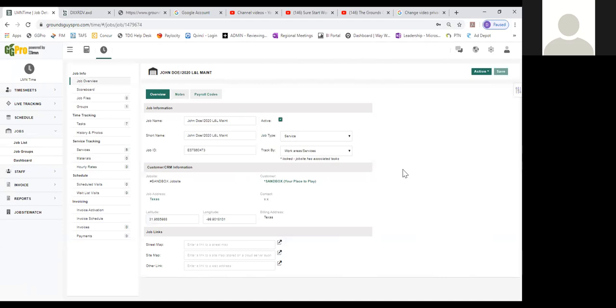So if they use 9 yards and the budget was 10, they're communicating back to you what their product usage was. I had a situation, we were in Toledo, going through their numbers, and they were talking about this one job. They said the job called for 82 yards of mulch, and they only put 47 yards down, and yet they spent like 90 hours doing it. And I thought, holy cow, it must have been a difficult job, like on a slope or something. So there were certain things that jumped out at us.